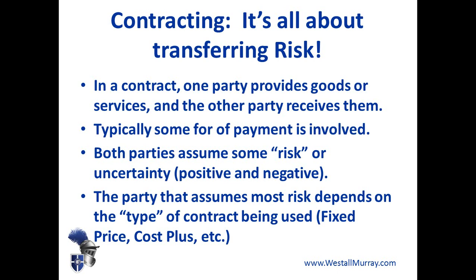Which party has what type of risk depends on what type of contract is being put in place. There are fixed price type contracts, cost plus type contracts, and also unit price contracts. Each of those types can be modified to slightly change who has the greatest risk.